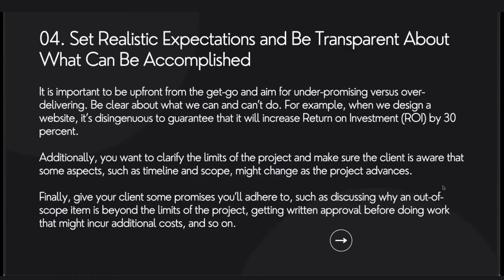There's a timeline here. And this is one of the most important things that I can talk about tonight: having the client get back to you and the project manager in a timely fashion, getting it done quickly and not having us wait. Because we will not wait. We take it and we go to another project. And then your client comes back 30 days, 60 days later, and wants it yesterday, and you're going back to the end of the queue. You can't just drop everything we're doing when the client decides, hey, I'm ready now. Again, it's about managing the expectations of the client.